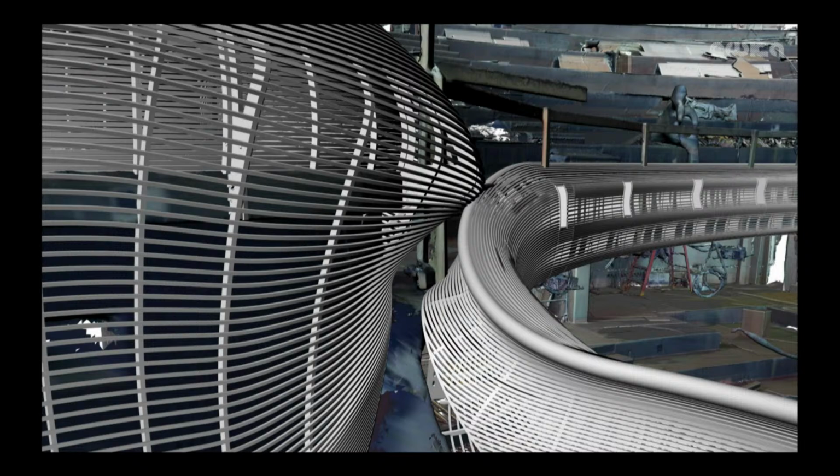And going back to that lifelong learning from mistakes. The concrete guys, this cost them, I think, about $250,000 to fix because it was their mistake. They were not building to tolerance. They had gotten themselves into a situation where the geometry was more complex than they were used to. And everyone's gung-ho in the beginning. This is going to be great. Well, I'll make it work out.